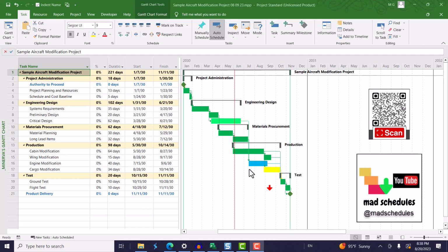One of the rules a lot of the contractors use is that it's 44 working days. I would say that it shouldn't be more than 20 working days because you want your task to finish within the same month or a month period. Because when you do contracts like that, especially for government, they want to see that the budget has been used within 1 month. They don't like to see that the budget has gone over into the next month in a task. So make sure to look at that and think about how you use high float. Negative float, I would say it is not recommended at all, so don't have any negative float.